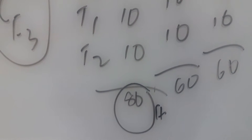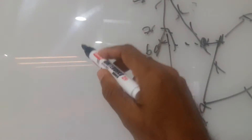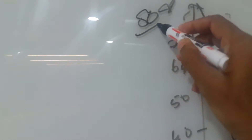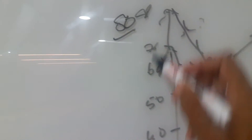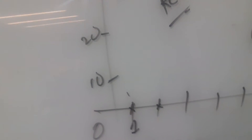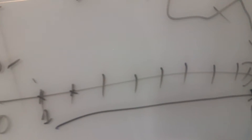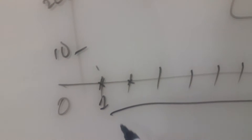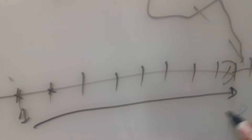That 80 hours gets translated into the y-axis of the burndown chart, so the y-axis will show 80 here — the total effort required to complete the sprint. On the x-axis, we have the duration of the sprint, which in this case is 10 days.